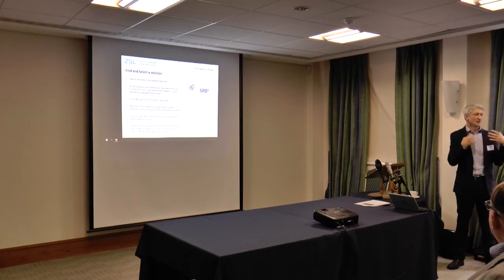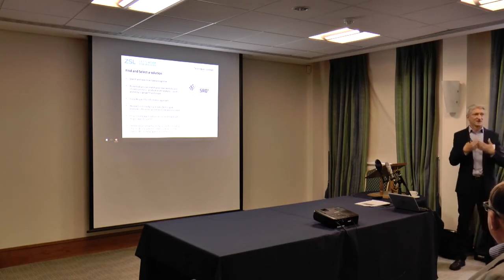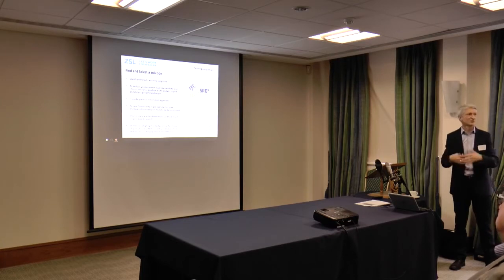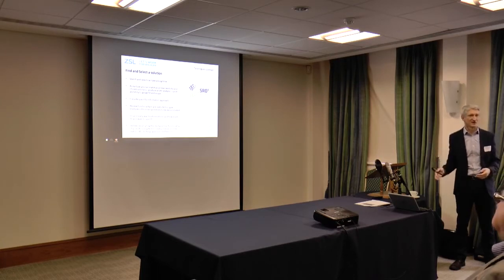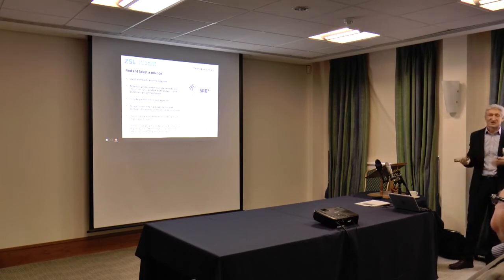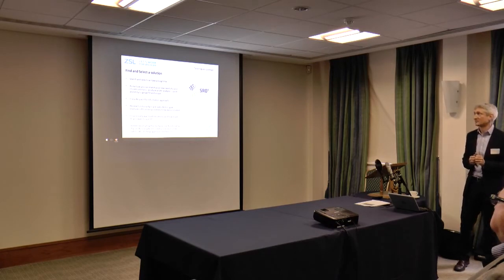So that was finding 20 systems, reducing them down to 12, then shortlisting them down to 6, doing the RFI, and then having got it down to 3 or 4, doing site visits. It goes on forever, and you come up with a winner at the end, and that's just the beginning of the project rather than the end. So these things can take a long time and can be expensive, but again, you need to think about how you're going to get there.